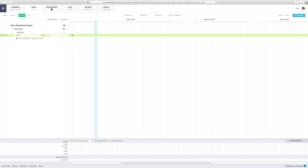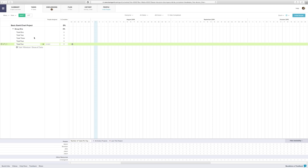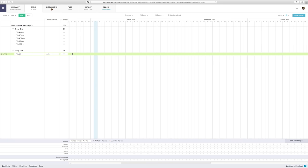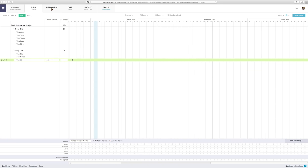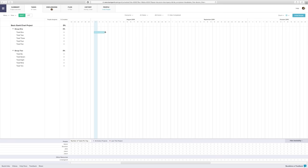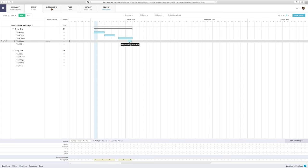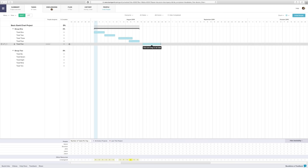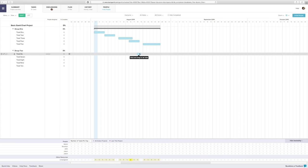First, I'll create the tasks by clicking Add Task. Then just hit Enter and create the next task. You can even create groups for tasks, which can really help keep you organized. Once I have all my tasks organized how I want, I'll just drag the taskbars out for as long as each task should take.